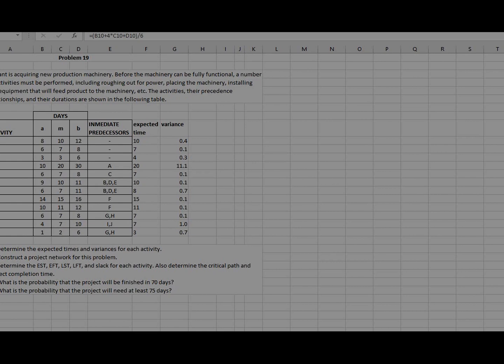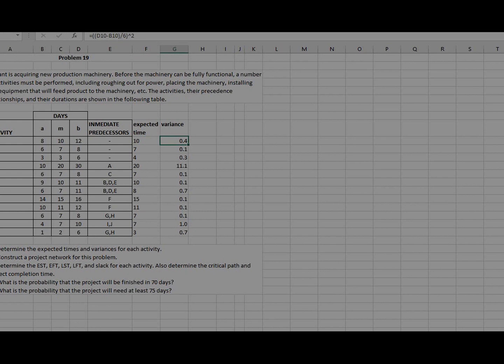Today we are going to create a network diagram for this question. The first item is to calculate expected time. The formula for expected time is: take the pessimistic time (8), add 4 times the most likely time, then add the optimistic time, sum them, and divide by 6. For the variance, take the optimistic time minus the pessimistic time, divide by 6, and square it.